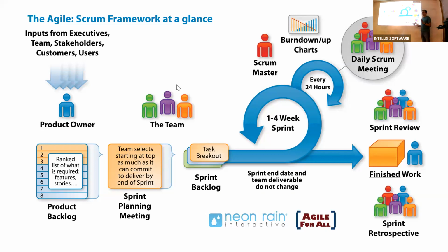So what they do Nationwide wise, the requirements document has to be something like what you read, what you have. Then the development process, they execute in the agile manner. Every 2 weeks, build new functionality. But requirements, they will take just like a paper document. They'll say, please sign off, even if it takes 6 months, please sign off on the requirements. Now we'll develop the software using the agile.